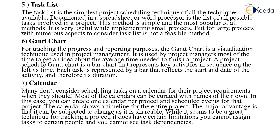The Task List is the simplest project scheduling technique of all the techniques available. Documented in a spreadsheet or word processor, it is the list of all possible tasks involved in the project. This method is simple and the most popular of all methods. It is very useful while implementing small projects, but for large projects with numerous aspects to consider, task lists are not a feasible method.